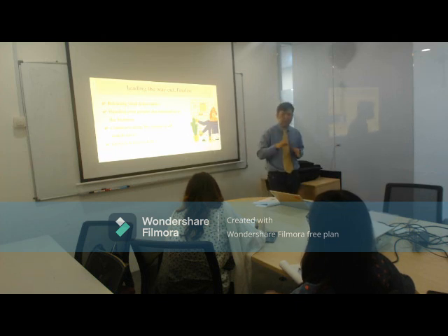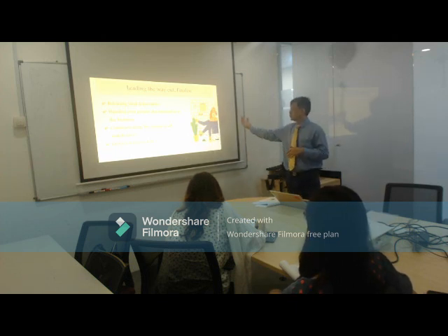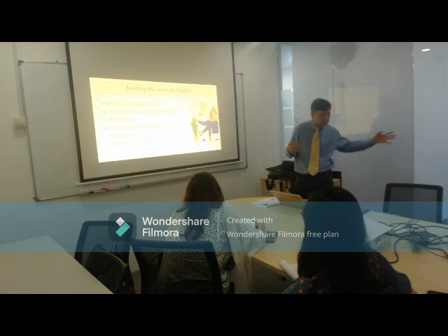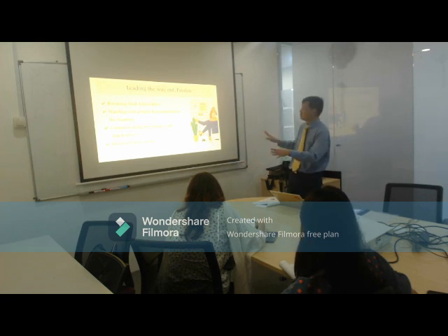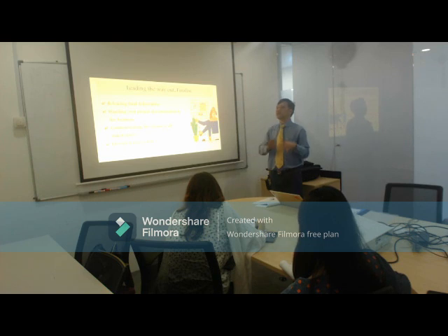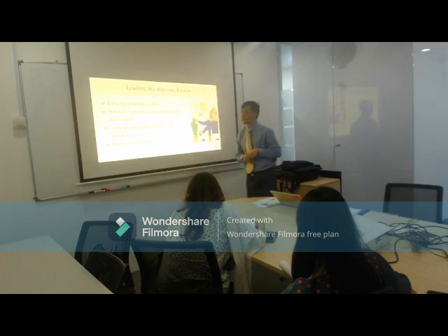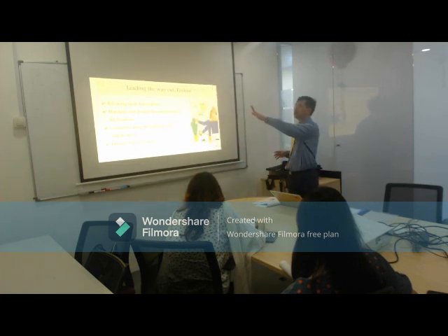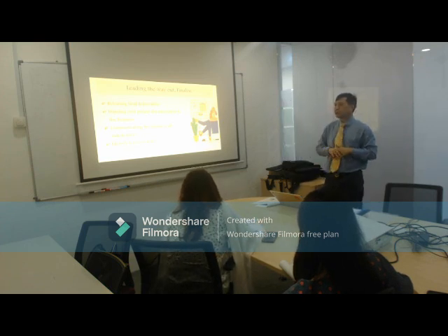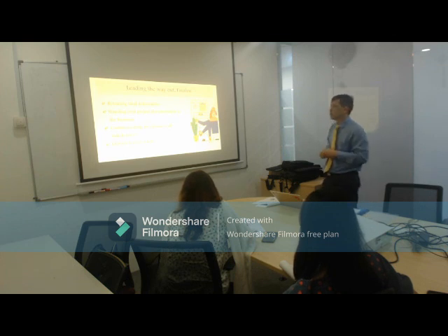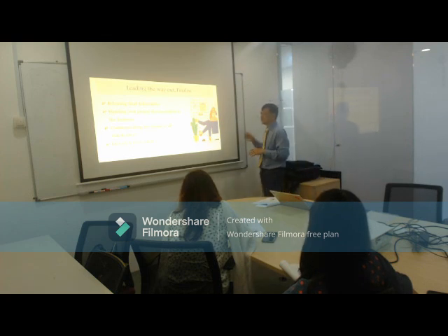So in our painting example, here's this. Project manager needs to tell Jack that yes, you managed to put in everything there, your task is done. You took out the furniture, now you put it back all inside, everything, all the tapes all removed, everything all fine. His task is done. Painter, beforehand, project manager would have told the painter, oh, okay, all these things all painted already, huh? Nothing, no extra cost for you. I'm not paying you anything extra anymore because it's all done. Right? You don't want the painter suddenly come back to you say, oh, I think we have to paint some more this part here. Okay, you don't have that problem anymore.